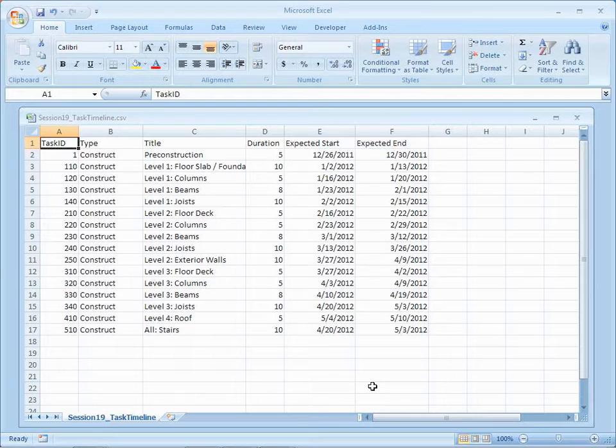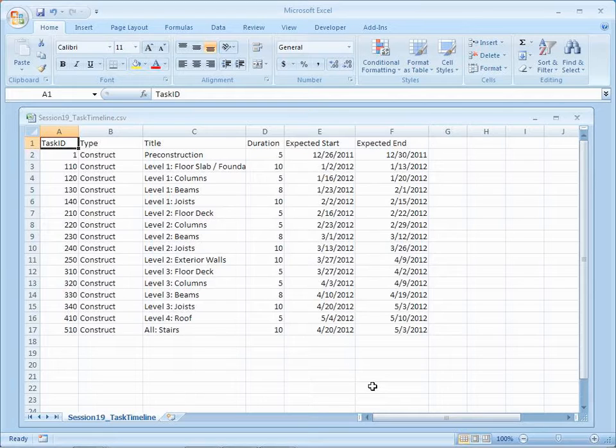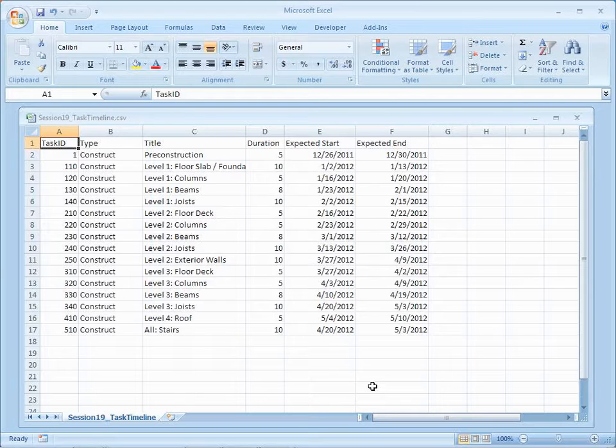Now, this is one way to construct it. This is sort of a very simple model of the project that has, oh, what is it, like 15 different items. There's the first because of the titling and kind of the pre-construction activities. It's about 15 different tasks. For the purpose of your assignment, we asked you to, oh, what was it, I said 20 to 30 tasks, something like that. Okay. You want it kind of at this level. You don't need an incredibly detailed model that breaks it down. But things as simple as the first floor foundations, the first floor columns, the first floor beams, the first floor joists. There's kind of an order to it. If you could picture this building being built, we would put the foundations, and we'd put some columns on them, and we'd put some beams. And before we could put the joists in place, the beams have to be there. Then we could put the floor on it. There's kind of a very simple order of operations that at a really high level looks something like this. Now, we could get much, much finer, but you don't need to at the first level. Like, this is enough to kind of get us going. If I refine this further, hopefully I could sort of compress and be a little more refined about the overall durations. But this is enough to get you started.